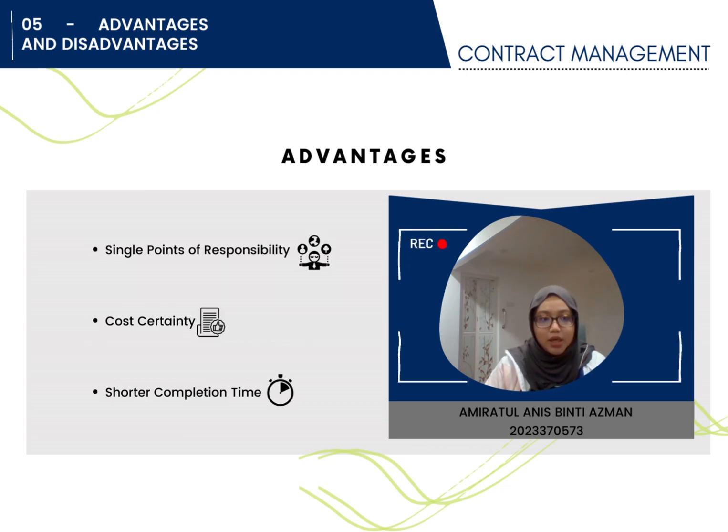It is because both of the project design and the construction phases are completely under the management of the contractor. As a result, the project can be finished more quickly and with a significant reduction in overall project duration.